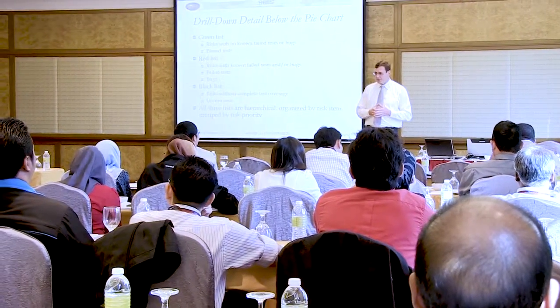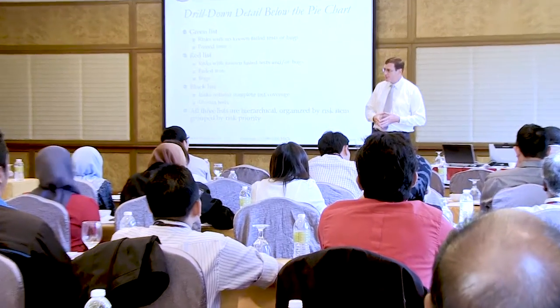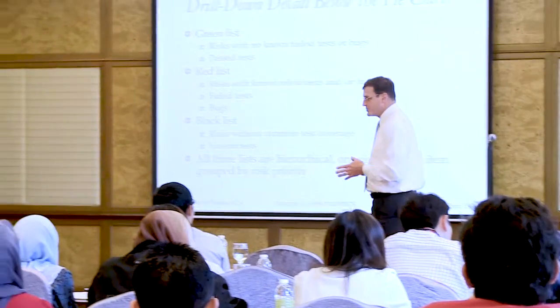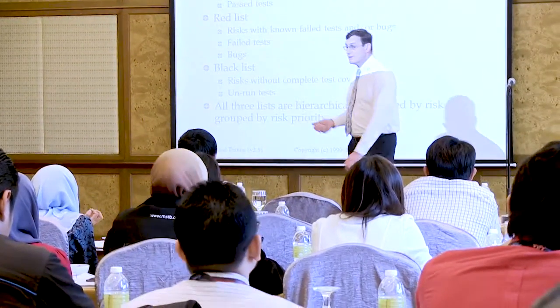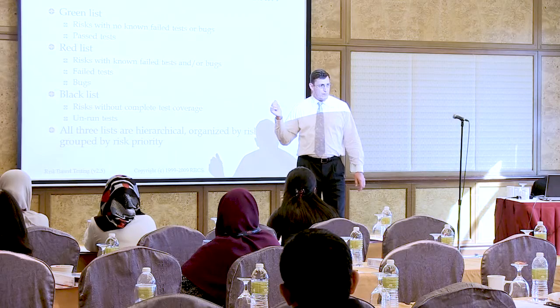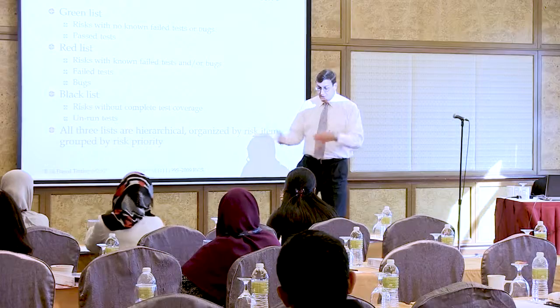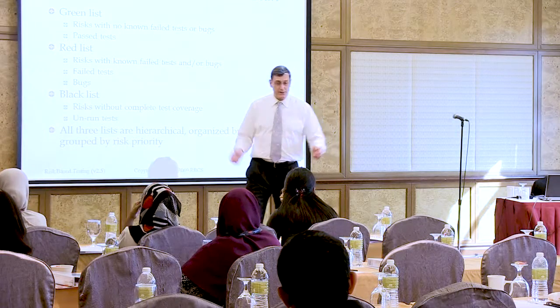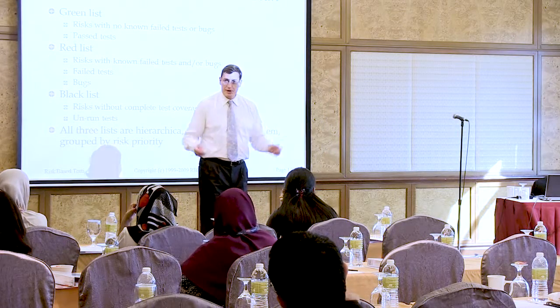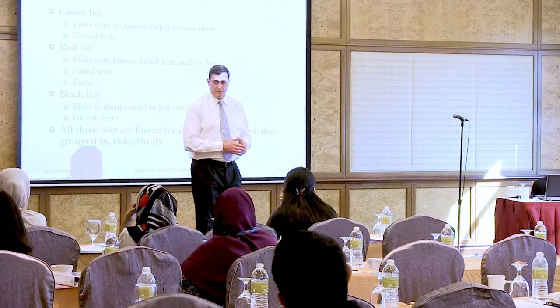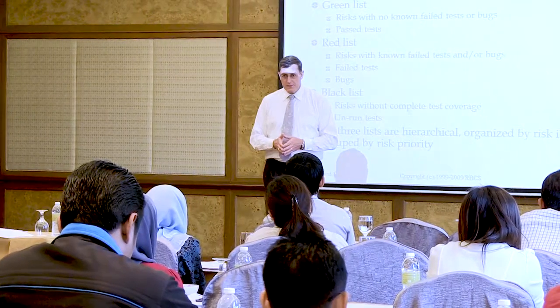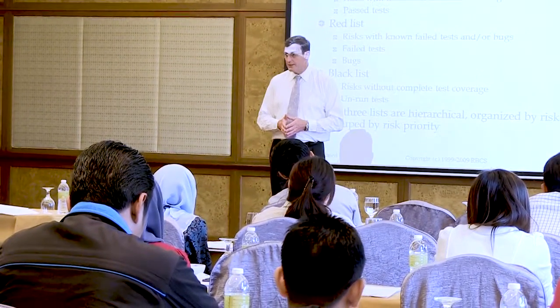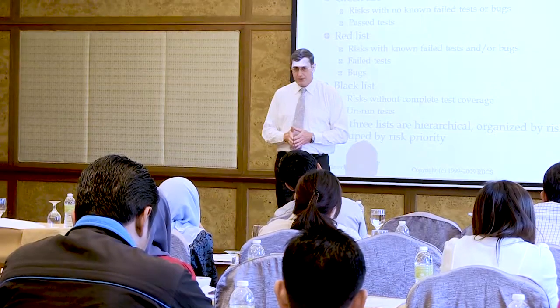And this is a problem because one of the major objectives of testing is to give stakeholders information so that they can make informed decisions. And if you're sitting in project status meetings talking past your stakeholders, you're failing. But this is what they told you they were worried about, right? So now you're coming back and going, okay, that stuff that we said that we were going to test, the stuff that we agreed was what we were worried about, here's the results. Here's what we found. See? So it's not like they're going to not understand that, because after all, you're talking their language. They literally told you what they were worried about. Now you're telling them what the status is.